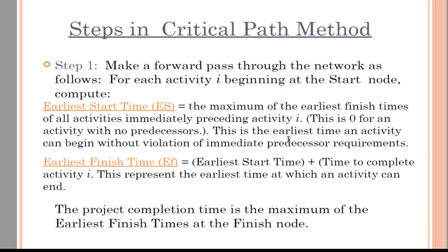Because जो predecessor आपका requirement है वो ये है, which says the predecessor should first finish, then and only then, because there is a relationship between the two. When the predecessor finishes, then you can move to the next node, right? So if the predecessor is not yet done, you cannot start this activity. The simple thing is, if you have to talk about the earliest start time of any node, you have to see what are the predecessors' finish times.